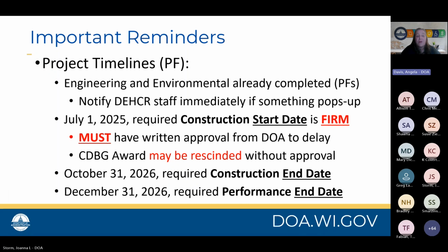your environmental review. So we want to ensure to not go out of compliance by proceeding with activities that weren't originally included in your environmental review. So just be sure that you are reaching out to the environmental desk and your assigned project rep.